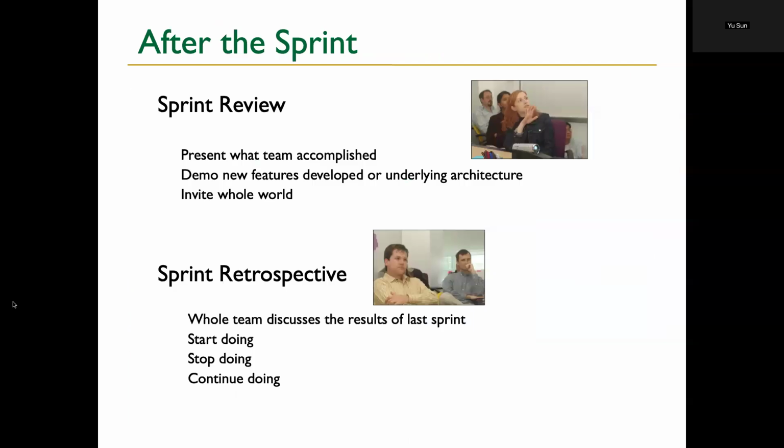As I mentioned, at the end of the sprint, that's 1 week, 2 weeks, 3 weeks, when you finish, we need to have some kind of meeting to review everything, to reflect on how things went. Did we plan too aggressively? We had too many things we didn't finish, or we planned too easy. Well, then we make some adjustments. We take a look at why we made the wrong estimates. So in the end, the whole cycle should work better and more efficiently.